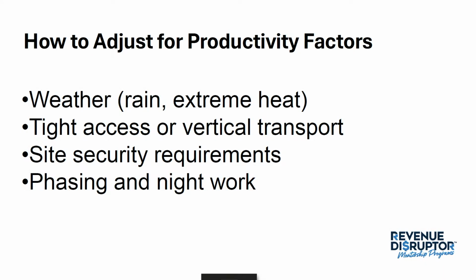Well, how does that impact your production rate? Or how does that impact how many hours they're out there working? So I want you to start thinking that maybe I have to tweak some of these production rates based on how productive they actually are. Maybe it's an area where there's tight access. Like for you, Isabel, in transportation, maybe there are certain areas that have heavy traffic. Now you realize the total number of miles that a person can do in a day will be significantly less.